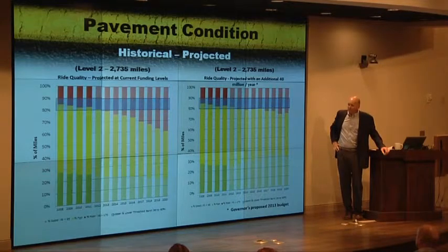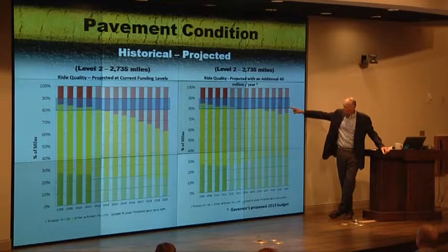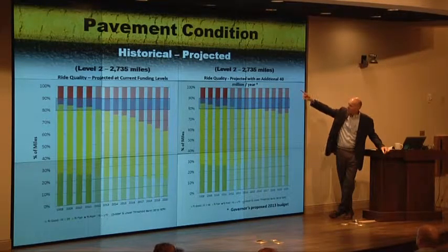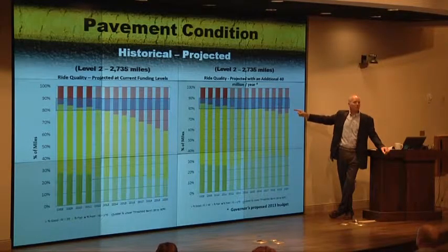And you can see what's happening to those conditions over time. We've projected that out to 2020. And you can see those conditions of those roads are getting pretty poor. Nothing anyone's proud about. Well, under the governor's budget proposal, and we were able to do this with our pavement management system, we're able to project what a $40 million additional investment would make if we put it just to those level 2s. And this was a pretty convincing story within the governor's budget.